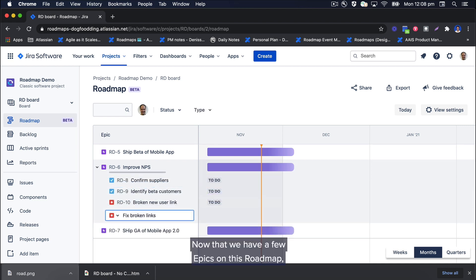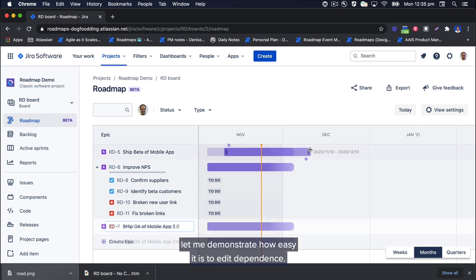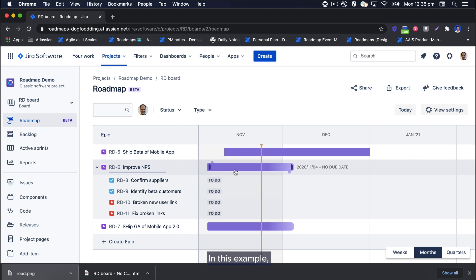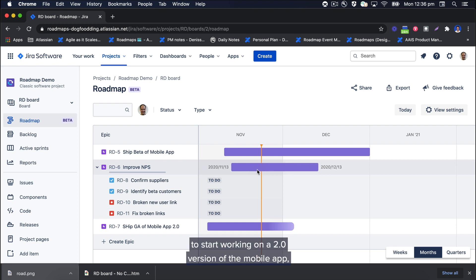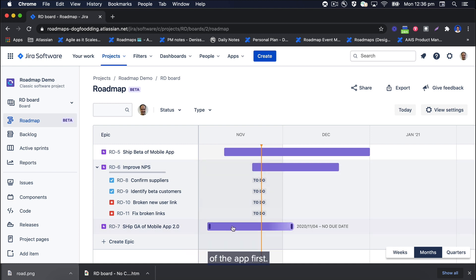Now that we have a few epics on this roadmap, let me demonstrate how easy it is to add a dependency. In this example, to start working on a 2.0 version of the mobile app, it will probably depend on shipping a beta version of the app first.